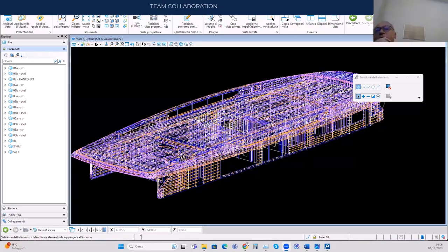Look, are there any revisions in the project? Yeah, sometimes there are. Okay, I can imagine the salesman who arrives to you. You begin to execute the order, then you get a revision, maybe forcing you to redo half of what you did. It can happen. Okay, and how are you handling this? You freeze the position at the current time. Then you create a new revision starting from the existing one, so the position remains the same. Also the file archive then. Yes, the file archive. I mean, you freeze everything at the initial stages and give it a revision index of 0, 1, etc. And the next stage will have a later revision index or a later date. We also use this for our internal reviews for myself or for the team.